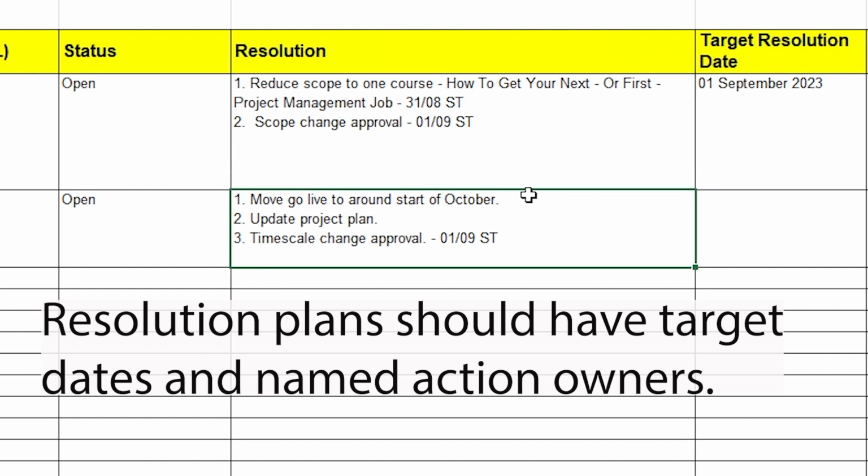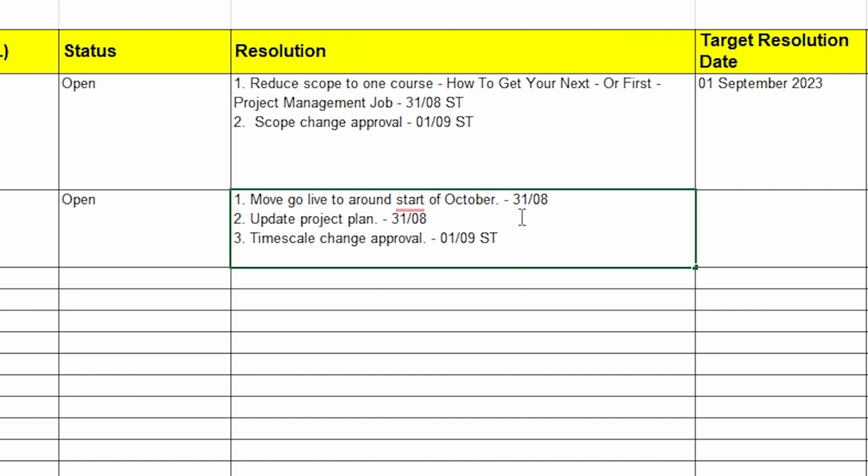change all of that. And if I'm changing all that and changing the dimensions of the project, once again, that's a change request. Because I'm making two changes that are fairly closely intertwined, I'm comfortable I can get away with writing one change request to cover all of the changes I'm making in these two issues.